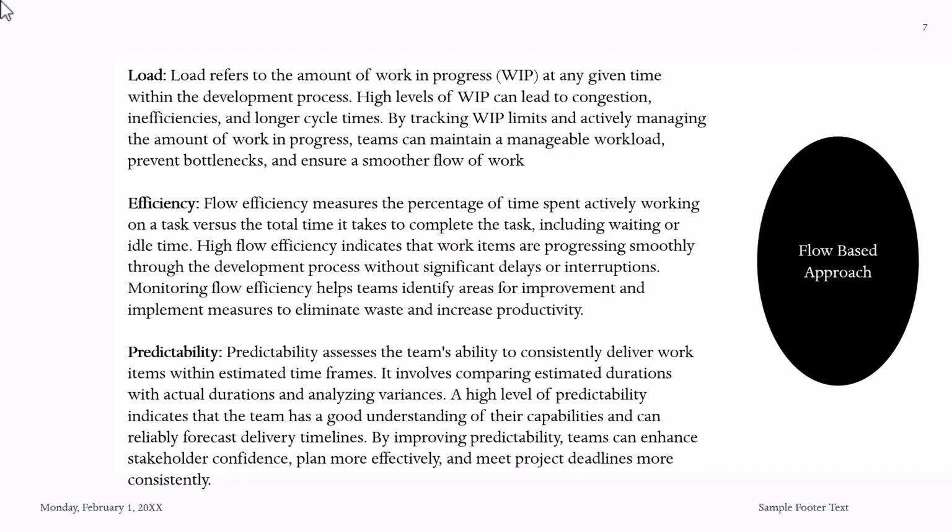So during sprint planning, you should make sure that the team takes stories. You can do backlog grooming so that we can come up with stories that are ready to be put in a sprint, and that should be small enough to cover the process of 2 weeks. So we don't want work in progress that takes too long. Maybe the team is doing some research. You should do this as a prerequisite of backlog refining, so that when the stories go into the agile team, the workload is able to go through 2 weeks of development work smoothly. So we have another one called flow efficiency.